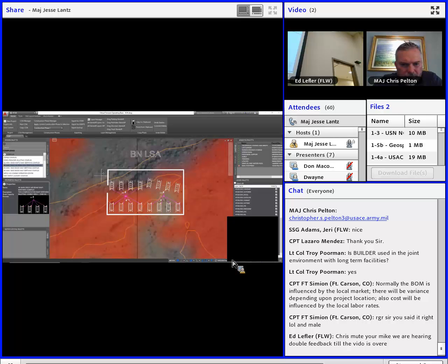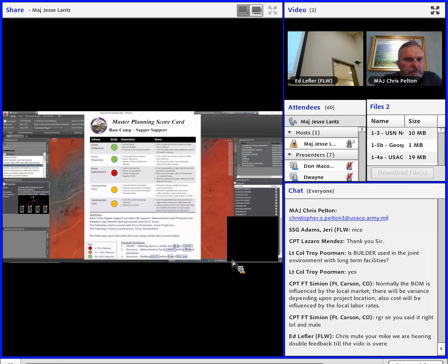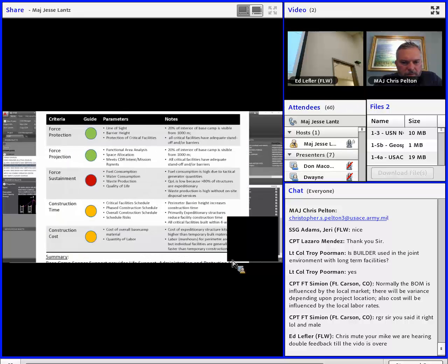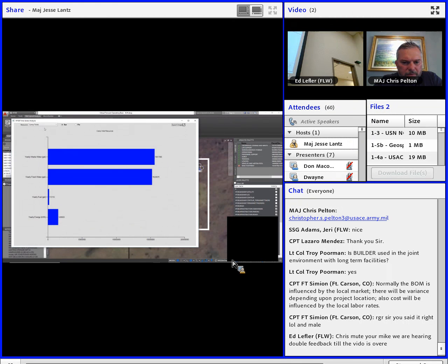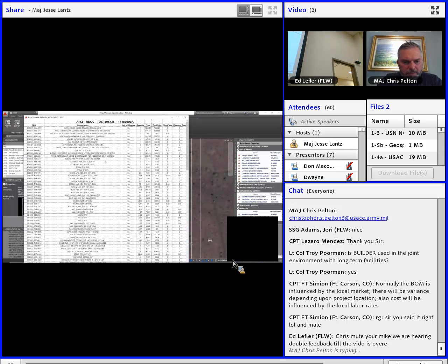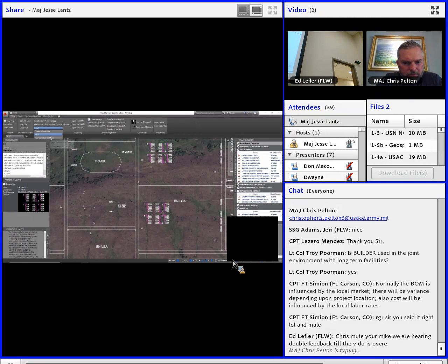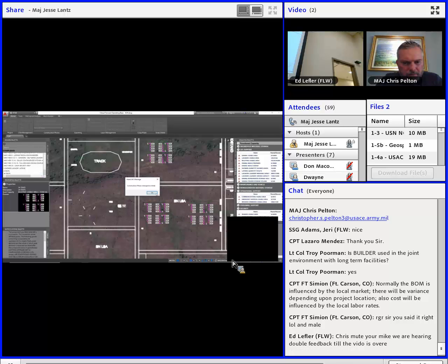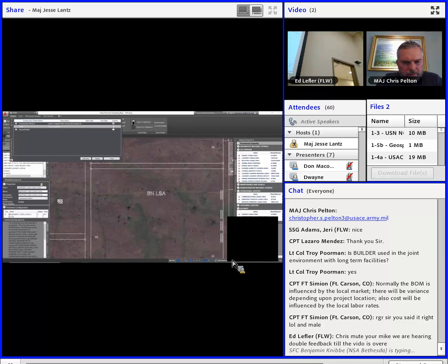The software produces estimates of logistical requirements as well as contingency-based scorecards comparing COAs. The planner can also run detailed or roll-up reports for individual facilities or the entire camp, showing bills of material and tonnage, labor and equipment estimates, as well as detailed drawings. Finally, the planner can further separate portions of the base camp by construction phase or land use category and builds time-phased construction schedules accordingly.